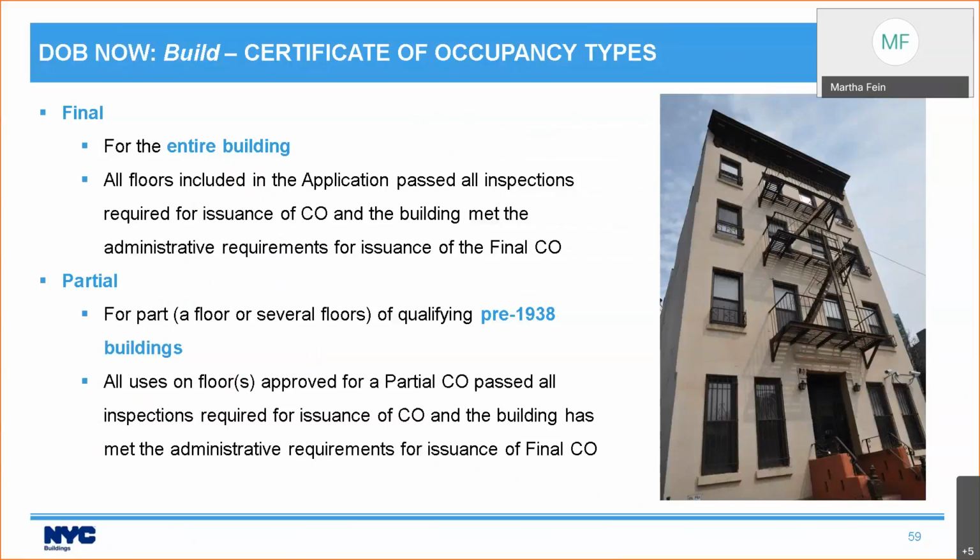Final occupancy is only going to be issued from DOB Now BUNLD for the entire building at once. Every floor that is included in the application must have passed all inspections required, and the building needs to meet the administrative requirements for issuance of the final CO.